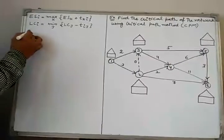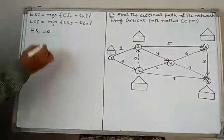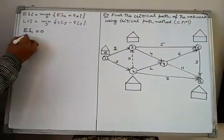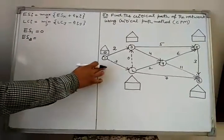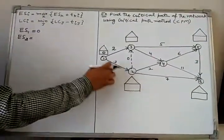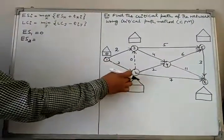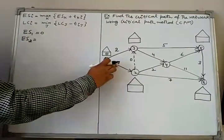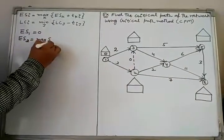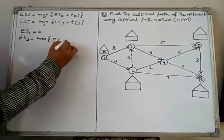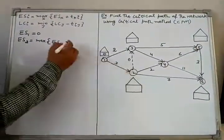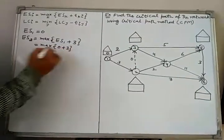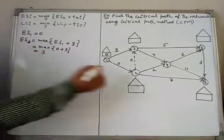By convention, the earliest start time of the first node is 0. Therefore, we take the earliest start time of the first node as 0. Now we have to find the earliest start time of the second node, ES2. First, look at the activities that end at node 2 — here one activity ends at node 2. Therefore, earliest start time of node 2 equals ES1 plus the time duration of that activity, which is 3. That is, maximum of 0 plus 3 equals 3. Therefore, earliest start time of the second node is 3.